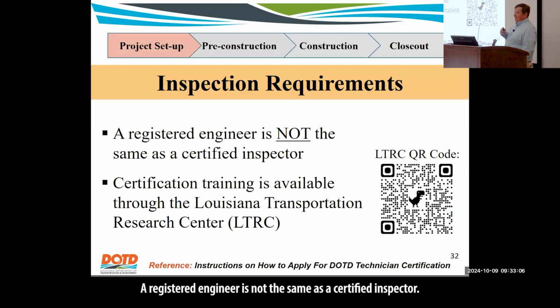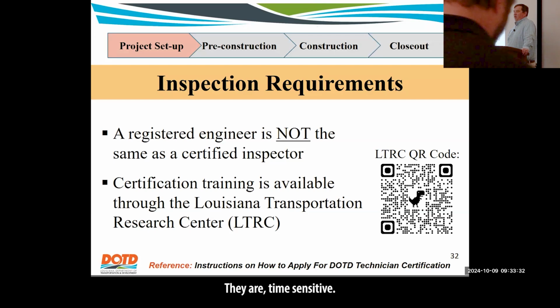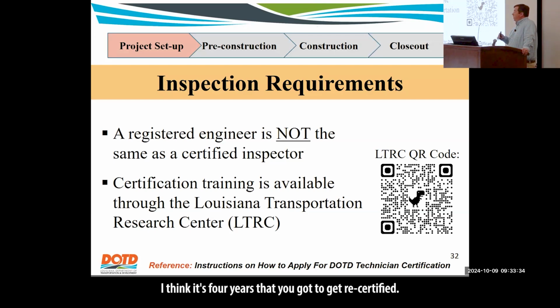A registered engineer is not the same as a certified inspector. So I am a registered engineer. I am not certified to take density requirements. I was qualified to make cylinders when I was a project engineer. That has since lapsed because, again, certifications and qualifications are not lifetime achievements. They are time sensitive. I think it's 4 years that you have to get recertified.